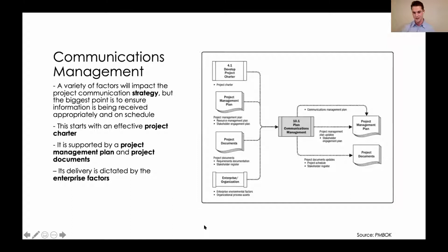So what does this actually look like as you're outlining a project? Say, for example, you've been tasked with spending a certain amount of money, and you have a team you're working with to accomplish this, and you're spending money on behalf of a company. You don't want to spend the money in a way that undercuts or sidesteps the folks the money is going to impact. Say you're working for Michigan State, paying to upgrade the sidewalks. I'm sure you're all familiar with these. You have to send out the email to the students and the faculty so they know, hey, you can't drive on this road starting on this day. Otherwise, folks might be trying to drive into work that morning and run over your construction crews. That is the tail end of the communication chain. It really starts far before that, but that's the forward-facing example of a communications management plan in action.